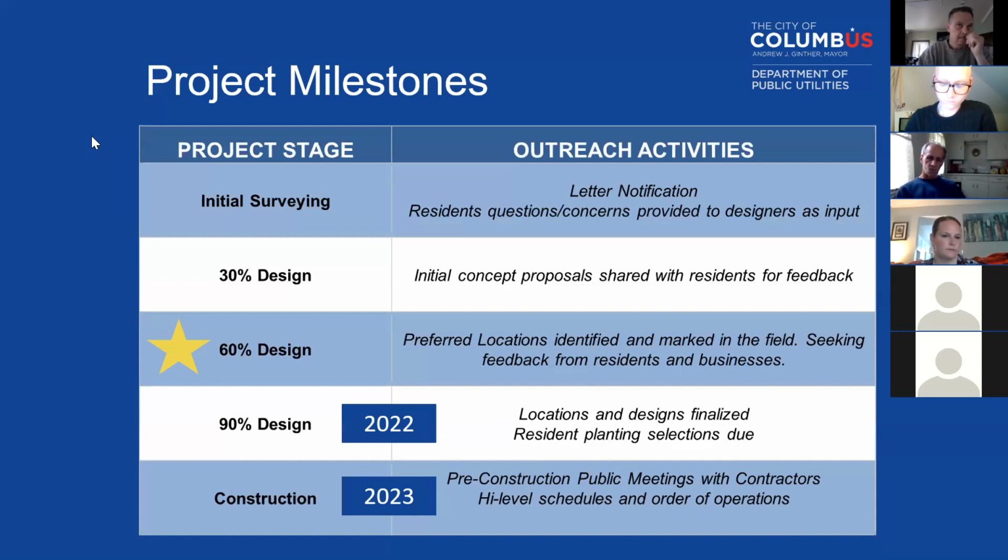Once the contractor's on board, we can share more information about the schedules you can expect, what the work would look like, and also have discussions specifically about how it impacts you. As Nick mentioned, the permeable pavers, while they definitely have a lot of benefits and are very popular, the construction process for that is difficult and much more disruptive than the individual rain gardens. And so we will be having detailed conversations with people about that to make sure that any mobility issues are addressed, any special needs regarding medical transportation and things like that.